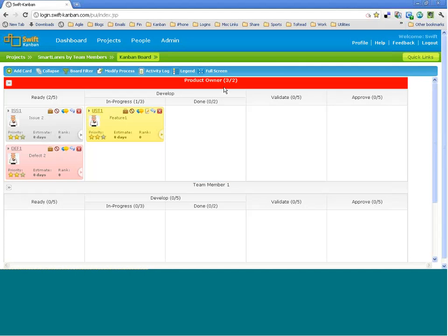this particular guy beyond its capacity, which you've set a work in progress limit of 2, and now it has 3. So it will immediately send notification to the team members or everyone in the team, as well as show you right on the board that there is a WIP limit violation. So this is also pretty handy when you want to do resource leveling right on the board. You want to define a limit to which the card the team member should pick up.